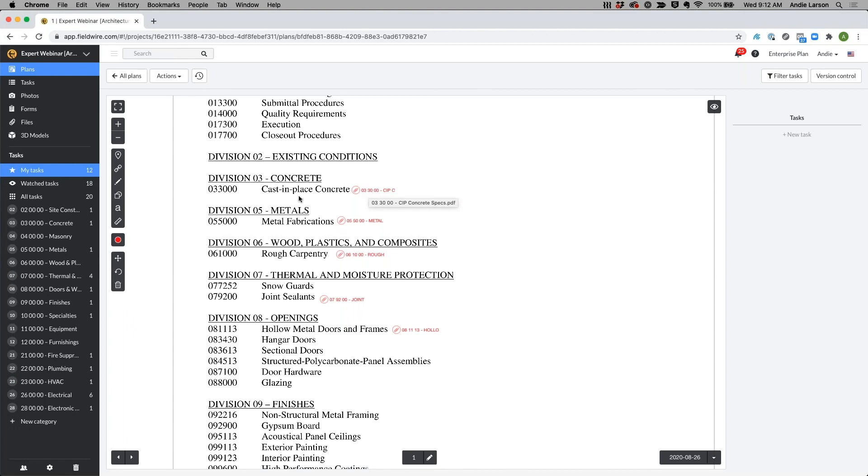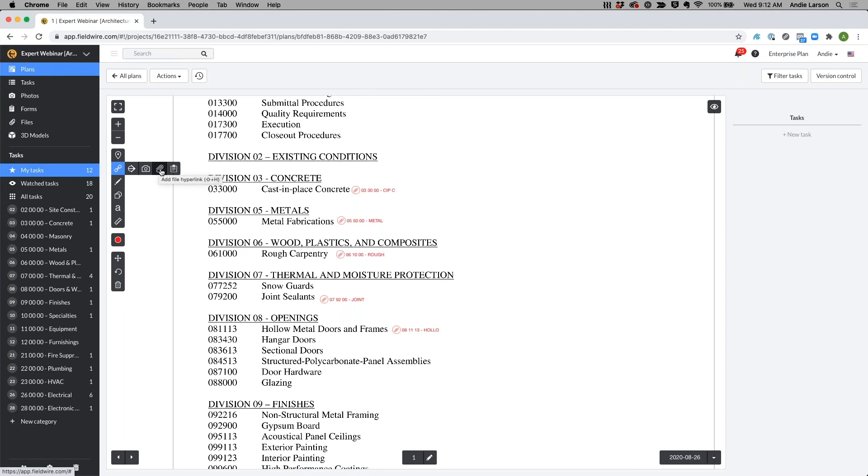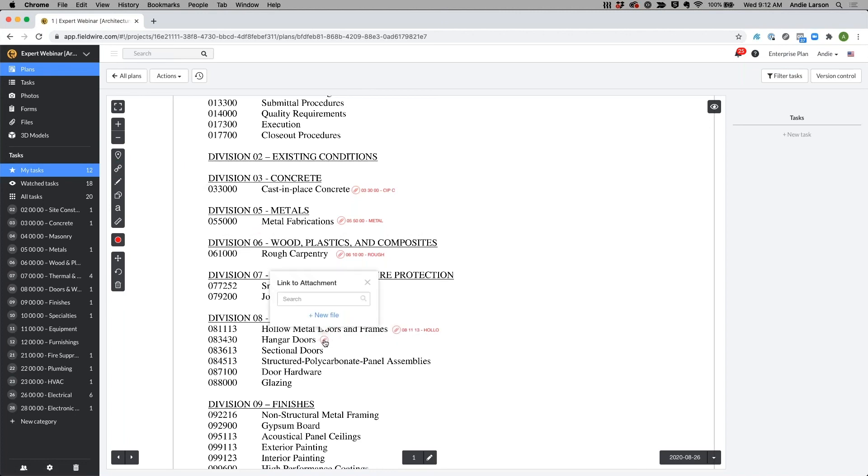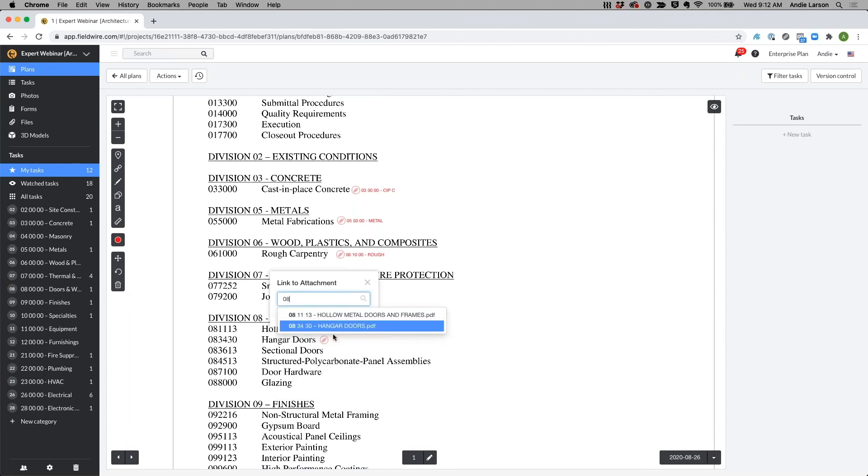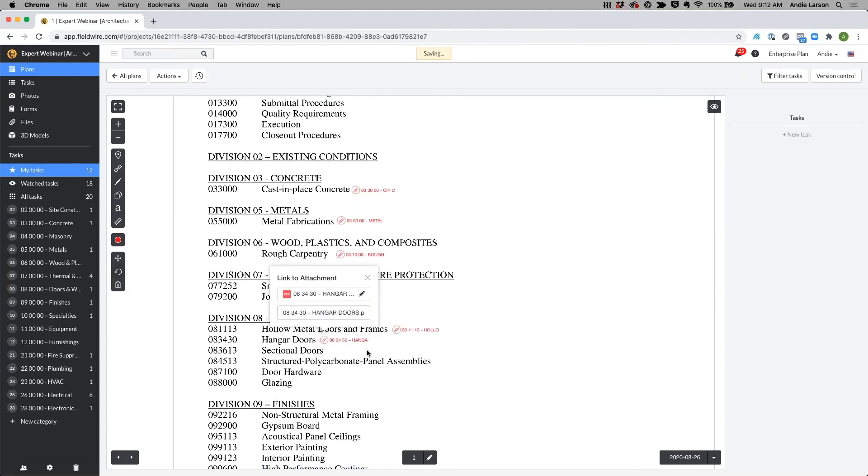So in this case you can see I've linked my different divisions directly to my table of contents and to do this you would just go to your markup toolbar over here and go over to the manual hyperlink. You see this paper clip which will reference any files. I can drag and drop it to the location where I need to add new specification sections and then I can type in the title of that spec section and add it directly to that plan.